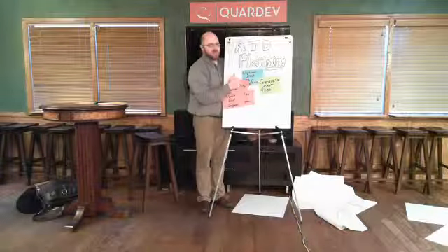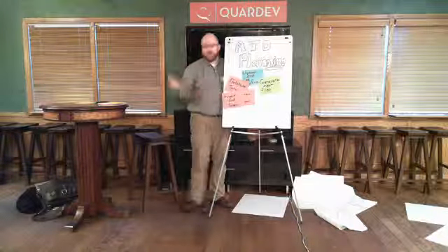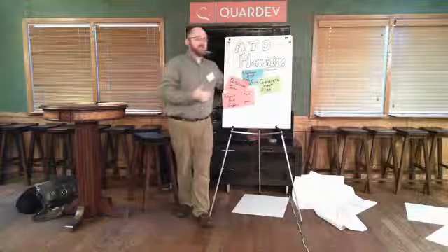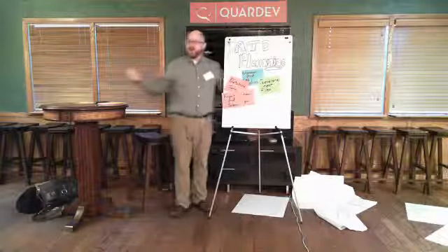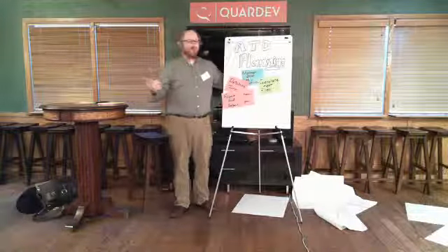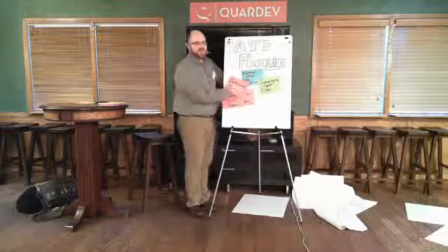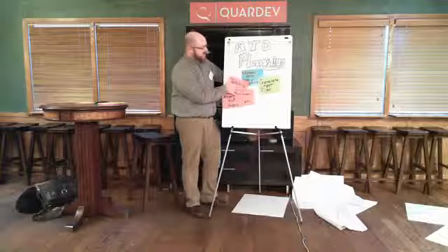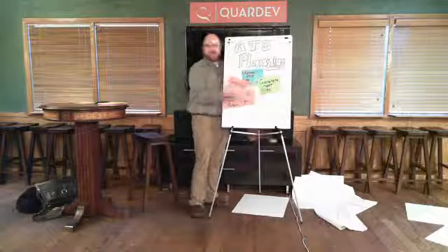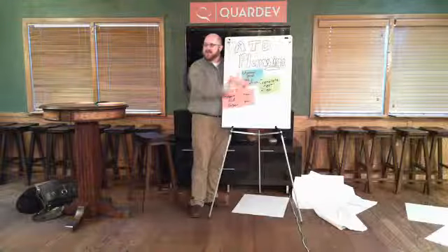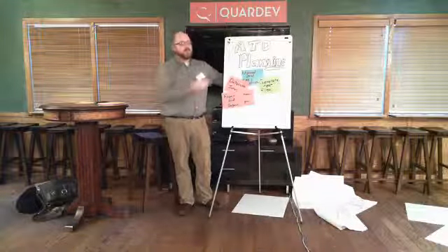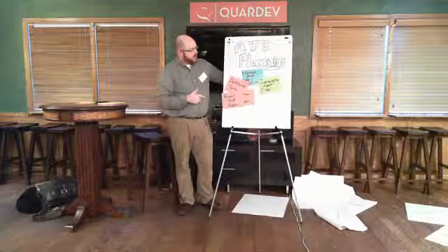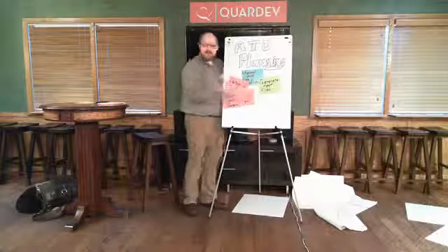Is this small enough? Your team can have a goal. I can't give you a number, but I like to see things that are testable every day. I've seen everything from 4 hours to, oh my gosh, we got from a month to a week, and we thought that was amazing. Whatever your goal is, you can see what we planned to do and how frequently we planned something to be testable, right here on this physical board.